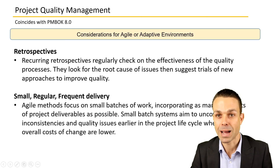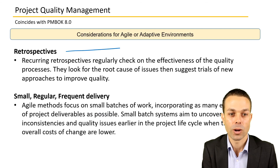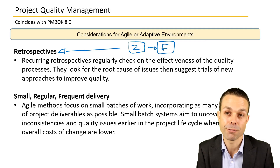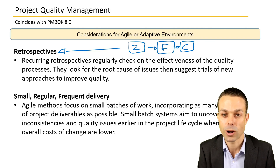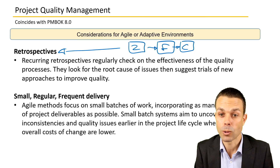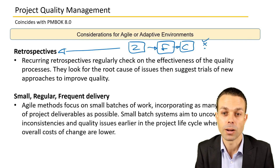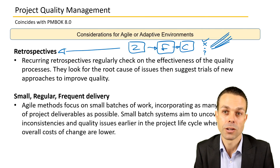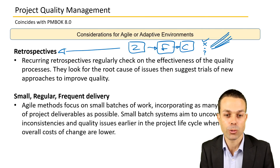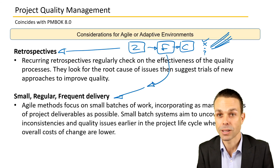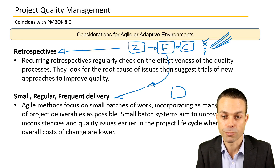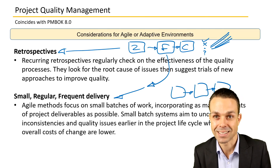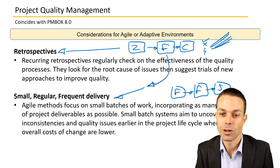Considerations for an agile or adaptive environment include retrospectives: at the end of an iteration — say two weeks — after delivering a feature the customer can see, feel, and touch, the team asks what went well, what didn't go well, what have I learned, and what still puzzles me. This allows the team to improve processes over time. Small, regular, and frequent delivery means delivering multiple features on a shorter time scale, getting a good idea of how the project is tracking and whether it meets the customer's needs at each feature milestone, not just at the end.